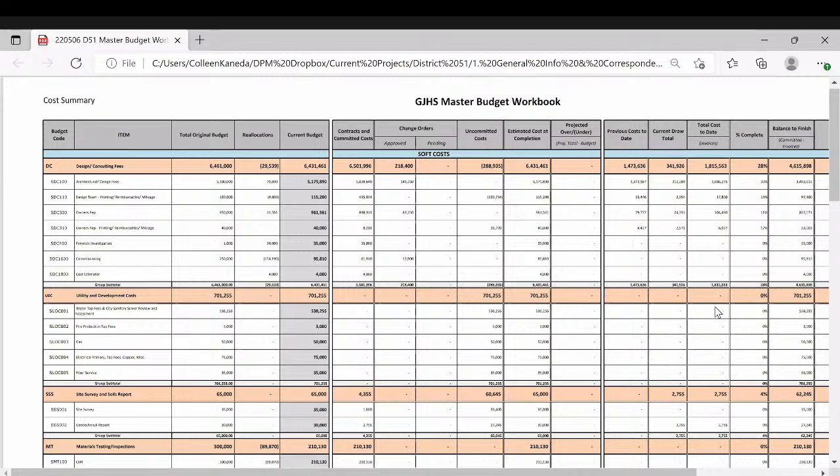But they're also forecasting it, right, in their DD estimate. They're trying to make sure that we're covered so that we're not at DD, and then we get to our GMP, and they're like, oh, by the way, you owe us, you know, it's $8 million more. They're trying to hedge against that as well. And we've had experiences where it let it go, and we didn't expect as much.